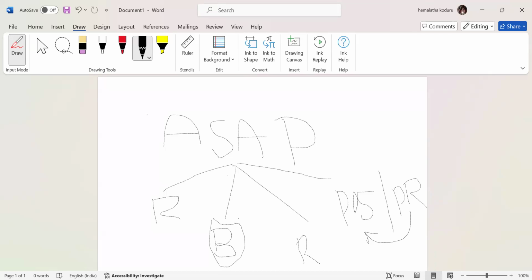Once it is completed and both parties have agreed that the requirement is very clear, you may be screen sharing and explaining, or exchanging email communications, and getting the approvals. Once the approval is completed in the blueprint phase, everything is documented and your design document is ready.